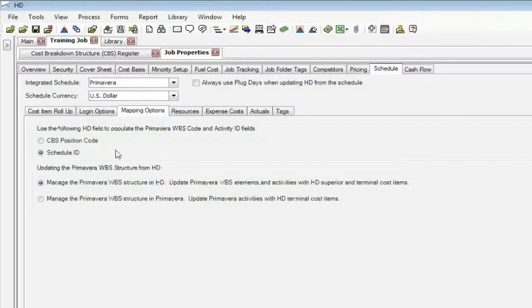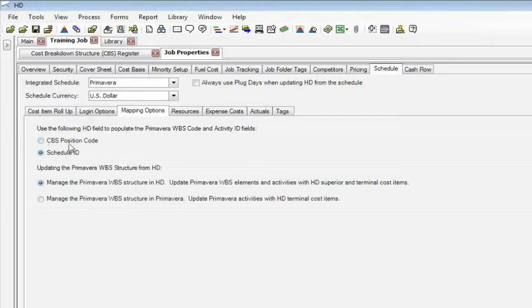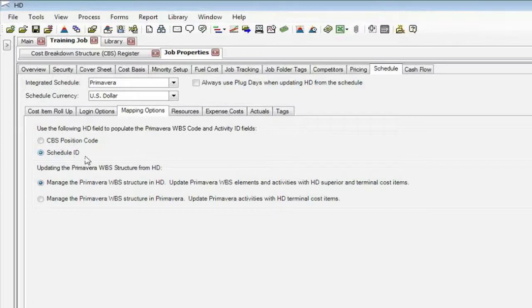We can send a lot of additional information out to Primavera that we cannot do from Project. So here are some options. We use our position code. This is normally what we would use from the CBS coding structure. Or if Primavera, we create a schedule ID. This is an alphanumeric field, which the user can change. But this will sort more quickly and more efficiently how Primavera usually does their sort.